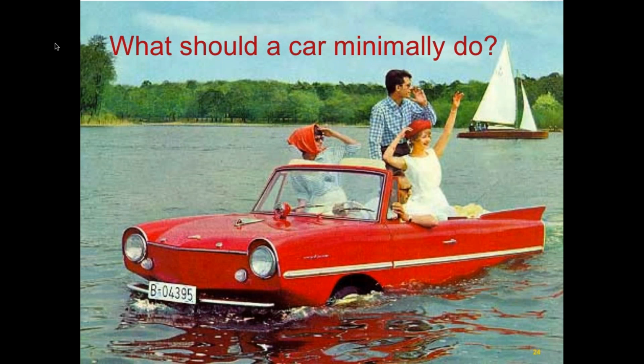So I said, let's define 15 or 20 maybe end-to-end user scenarios, customer journeys if you like. And let's make them so simple and so basic that we all agree that if one of those end-to-end scenarios is not working, we're not done yet. It's similar to a car: you can talk a lot about what it should do and what makes a great car. But we all agree that if the engine doesn't ignite, then we cannot drive away. The car is not done yet.